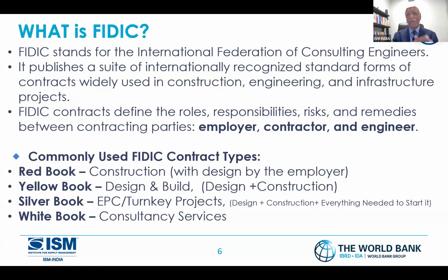So the design is also there, and the build is done by the supplier. What we say is design and build: the supplier does the design, the supplier does the construction, but the supplier doesn't give you the end things. Let's say I'm making a hospital building, the guy will design and make the building, but inside I want to buy MRI equipment and an X-ray machine, they will not do it. That's the Yellow Book.